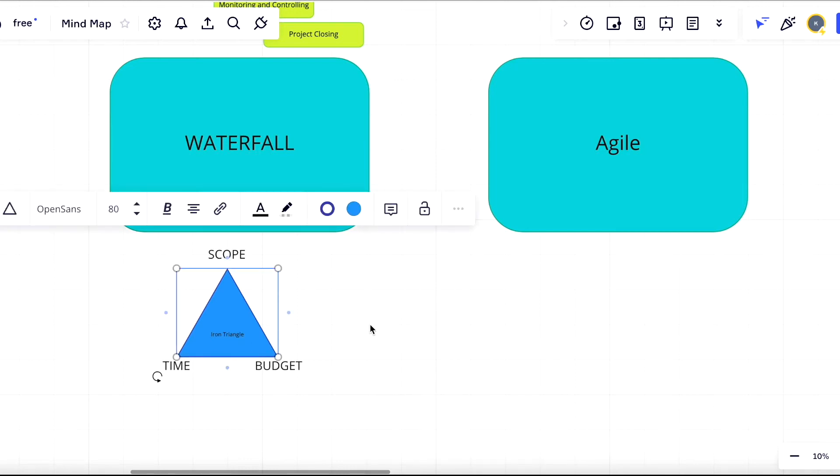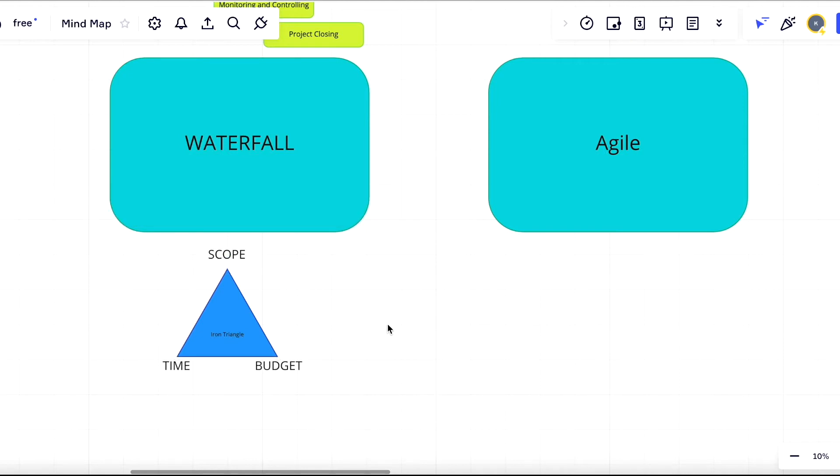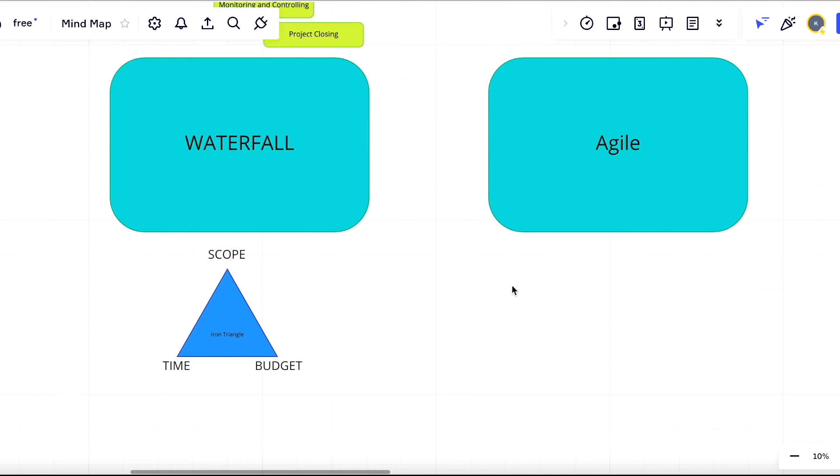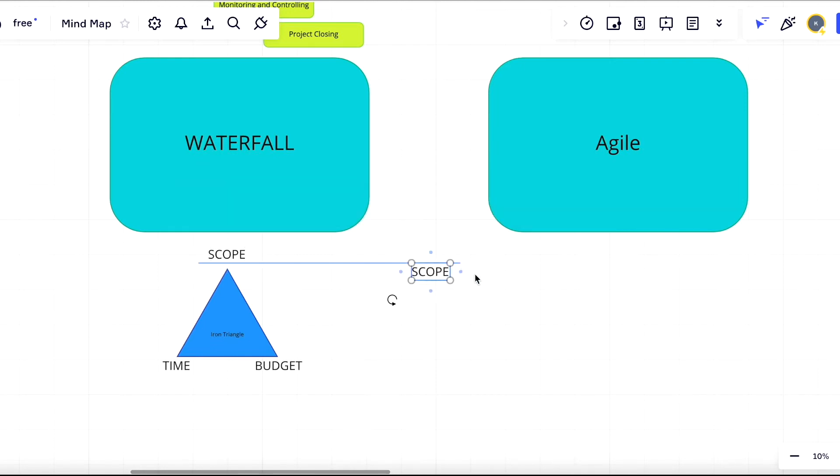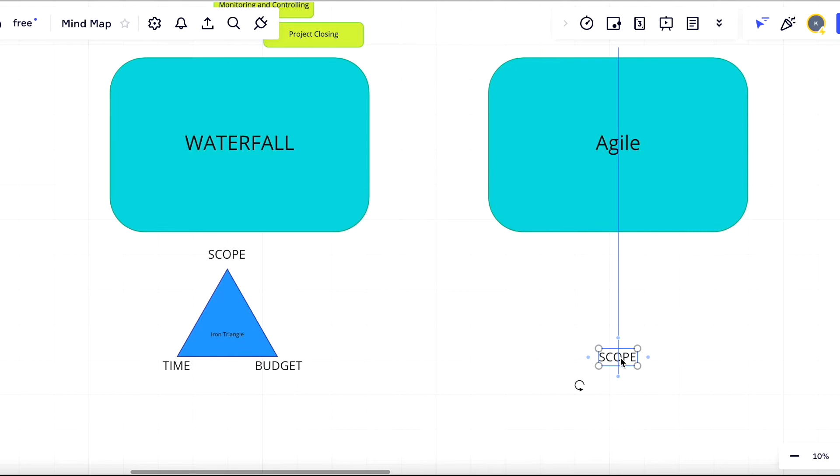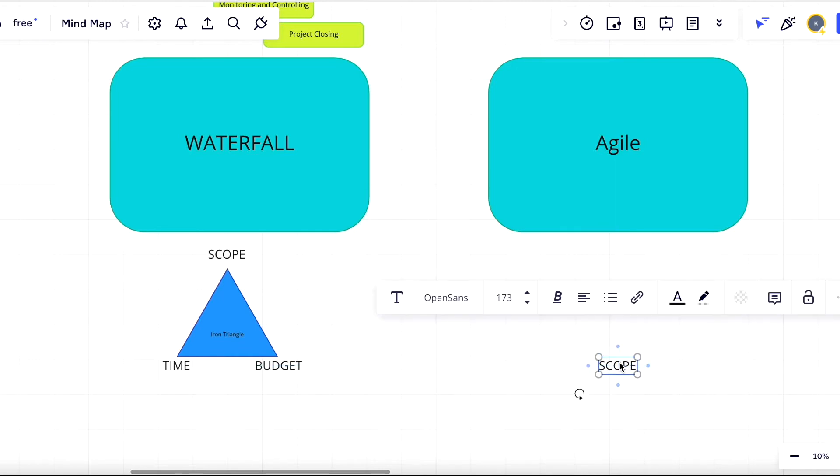The key benefits of agile is that with agile we are able to deliver a better project and better quality by getting consistent feedback from project stakeholders. This means with agile we are delivering the scope of work incrementally: giving a small piece of item, getting feedback, adapting the rest of the scope, again giving a bigger piece of product to users or stakeholders, again getting feedback, adapting the rest of the scope, and so on and so forth.